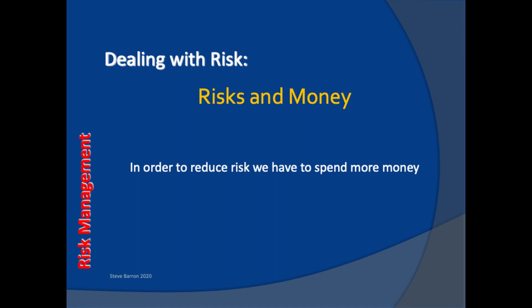Risk can become severe and seriously affect project outcomes and how project success is perceived. It can become more important to reduce potential risk than to limit the project budget. Therefore, we might decide to invest more money into the project in order to address and remove high-risk areas. For example, it might be more expensive to subcontract part of the project, but completing that part in-house could introduce significant workflow risk.